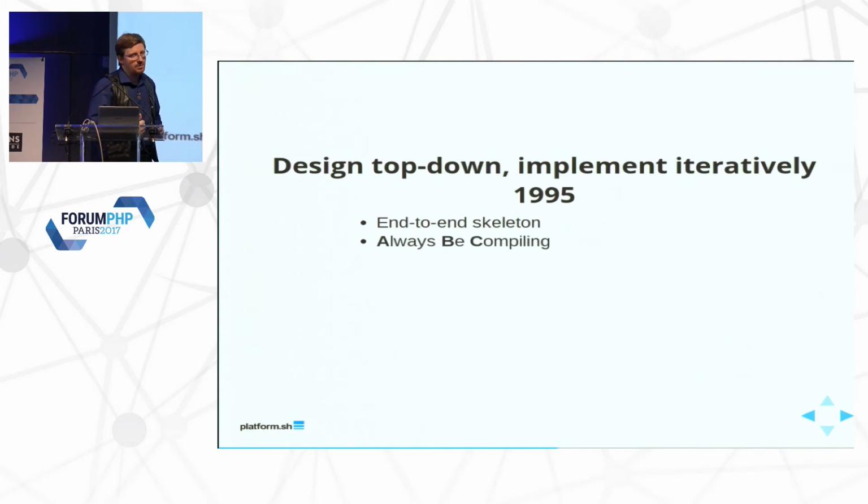And make sure it compiles or runs and executes whatever you're talking about. In PHP, make sure it returns a 200 response or whatever. And then grow modules in place. Slot in additional functionality into this skeleton as you go. This initial skeleton could be a third of your entire program.